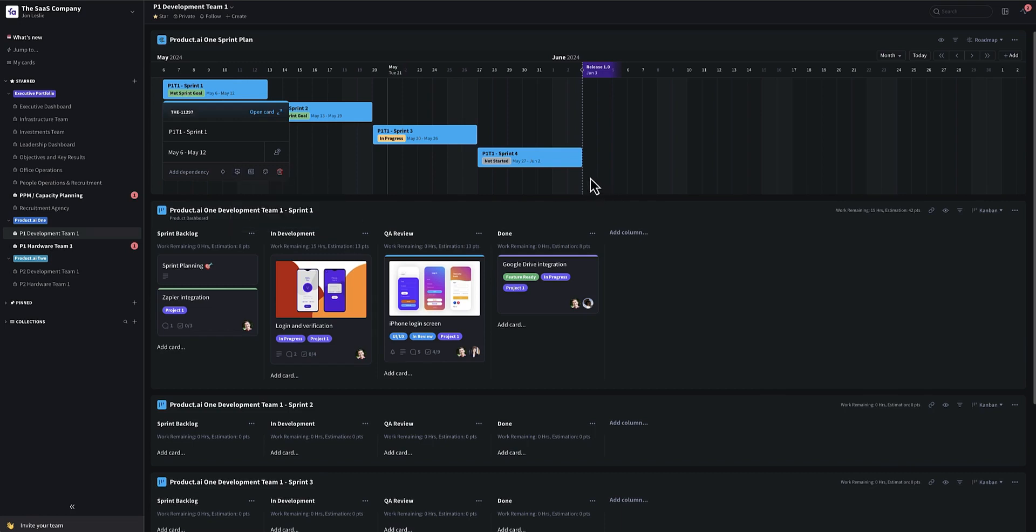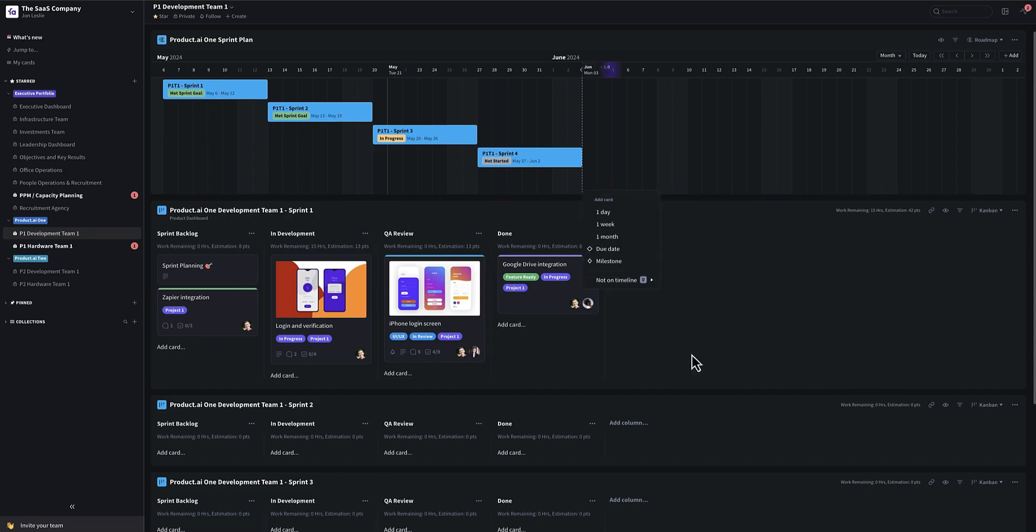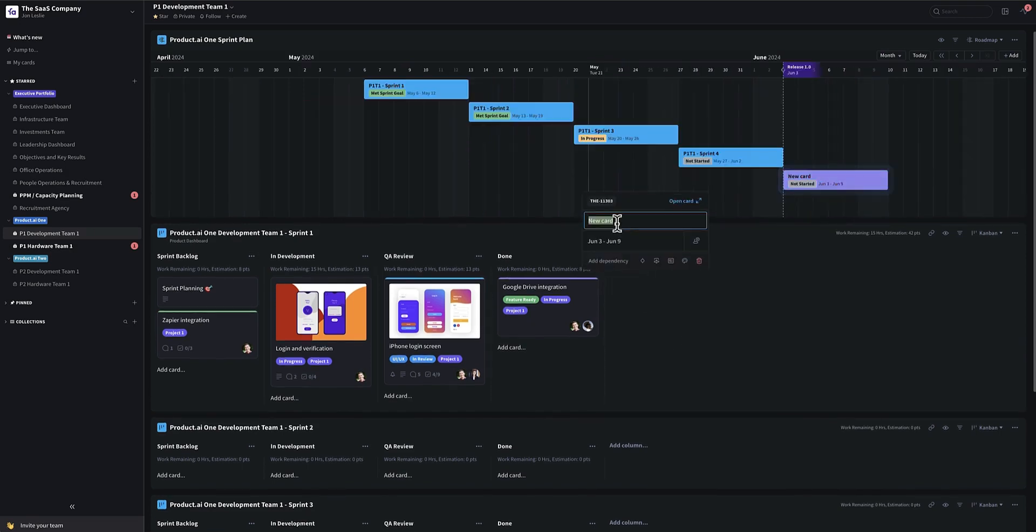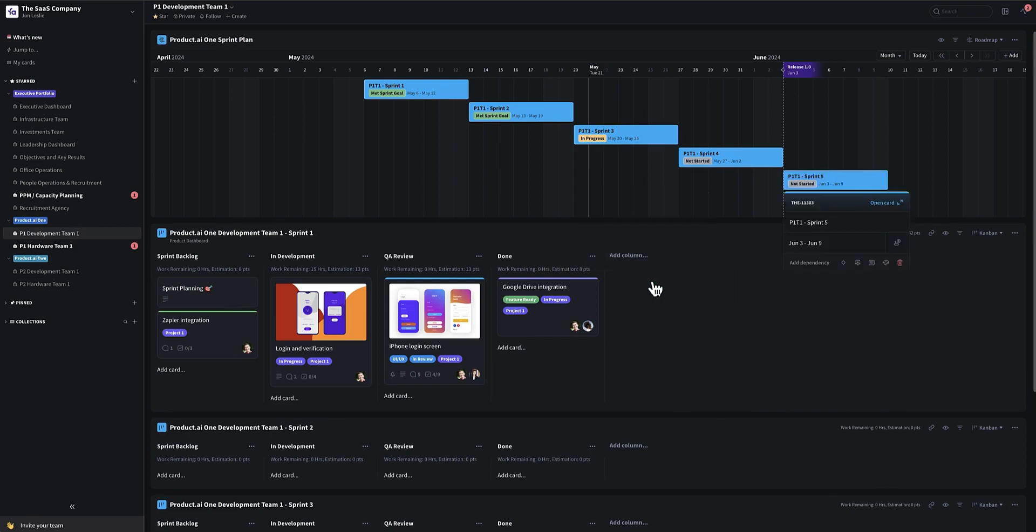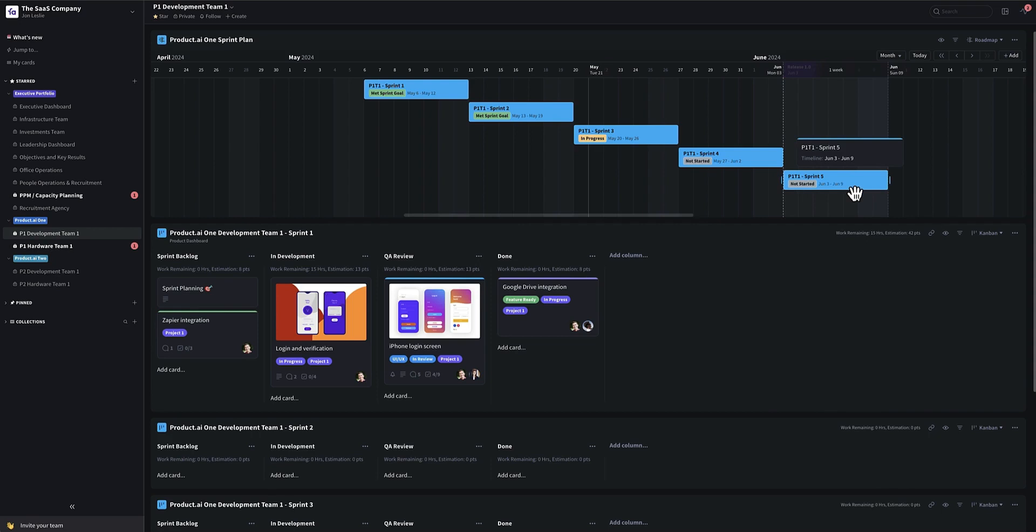So if I wanted to create a sprint five, for example, I would just click here, say one week or two weeks, however long your sprints are. Like this. Maybe give it the same color representing the team.